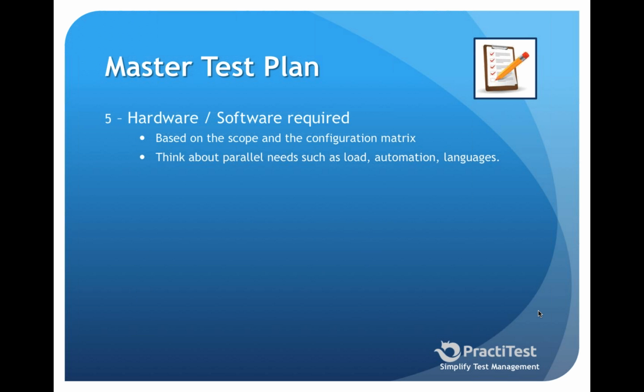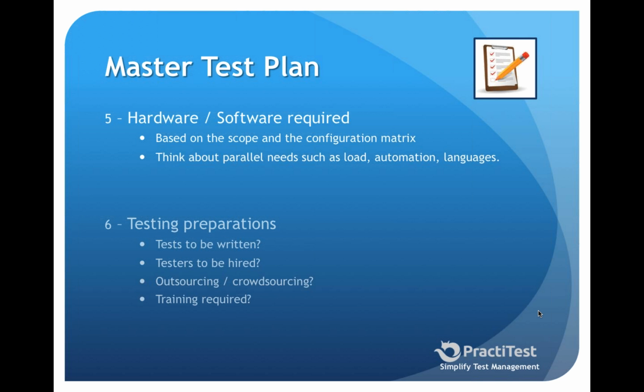And the development actually worked on an emulator of that. And when the time came to test, we said, hey, where's our machine in order to test? And the guys in development said, didn't you order it before? We're like, we didn't. We thought that you were going to bring it here. And all of a sudden, we realized that no one had ordered that machine. And we obviously needed to test on that. So we went and ordered it, but we had a delivery time of about 8 weeks. And even though the project was a year long, 2 months of waiting was a lot of time. And again, we delayed the release, not only for that, but for a lot of other reasons.